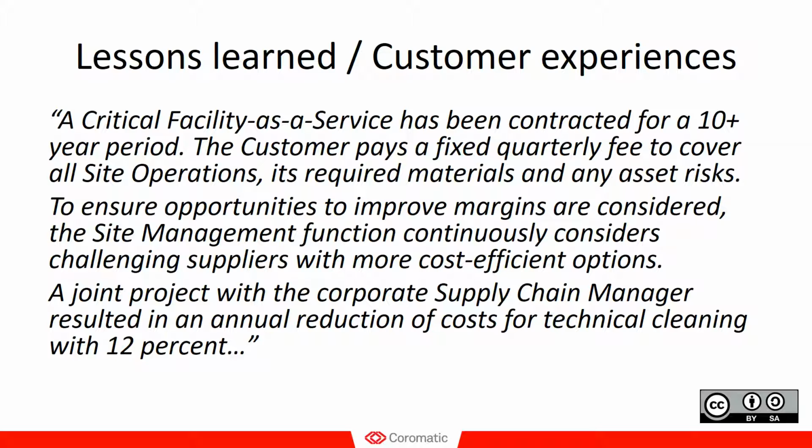So this example is actually from a customer contract where the whole critical facility is delivered as a service. That means it's a longer than 10 years contract, and the customer pays a fixed quarterly fee which covers all site operations, all materials, all time spent, and actually any asset risks.